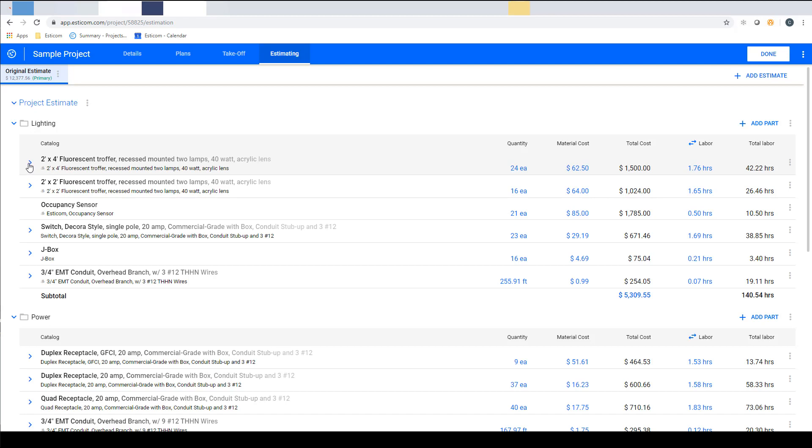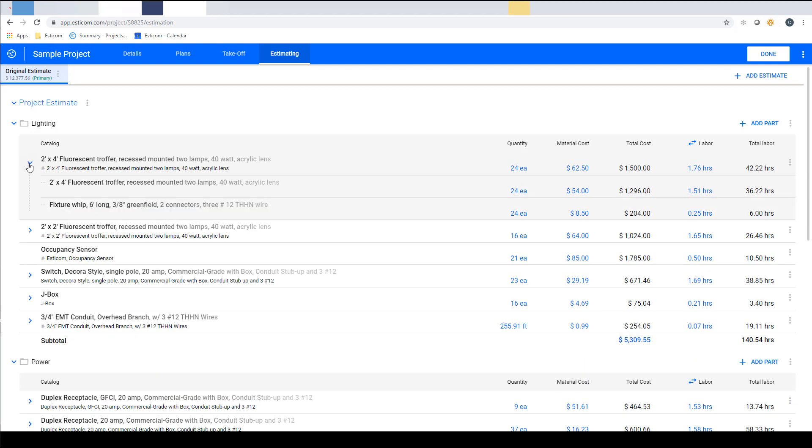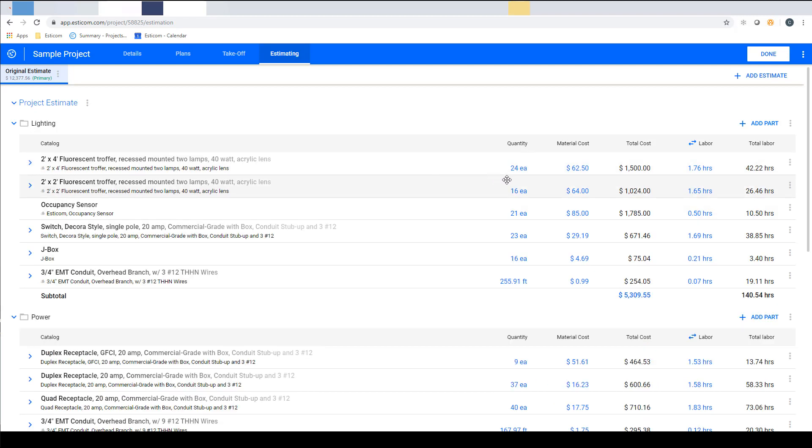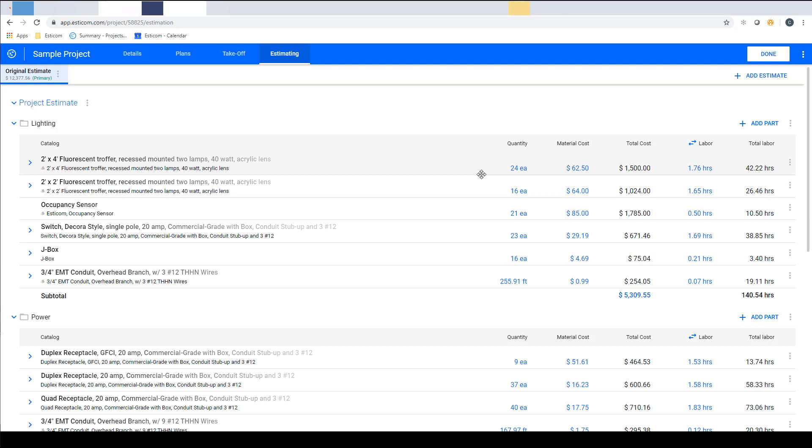If you click the arrow you can see the subcomponent. To the right in blue you can see the quantity, material cost and labor rate which are all adjustable, and total cost and total labor in black which are extensions of the previous cells and automatically updated as the quantities, cost and labor rates are adjusted on a per project basis.